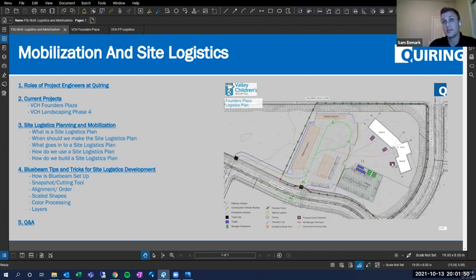This is an early logistics plan that we put together. Our superintendent has 1, 2, and 3. It turns out there are going to be 14 different spots that the crane is sitting along this as it's moving. So, like I say, it's early, but we're getting it a little bit more fine-tuned, making sure that where the crane is sitting doesn't impact our slab on grade, because a lot of times cranes will want to go on your slab, and usually structurally that's a no-no. Sometimes it's not.